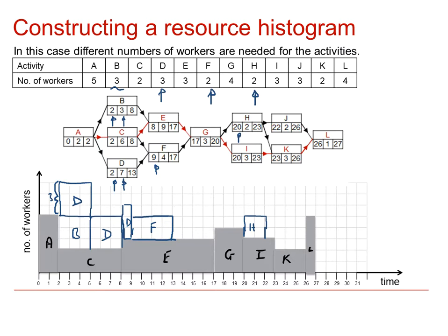I is on the critical path, so now we're moving forward to J. J is duration 2, starts at 22, and needs 3 workers. So notice that J is going to split as well. The first part of it is there, that's 1 day, height 3. And then the next day, height 3 is there. So that's duration 2 and height 3 for J. And there we are, there's our diagram finished, and that shows the number of workers at any stage of the project.